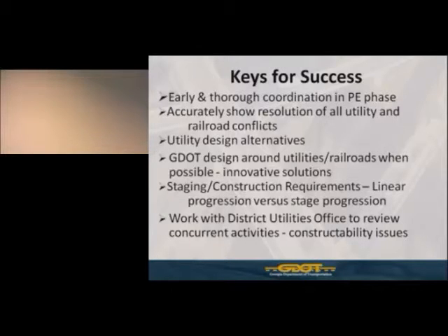Mentioned earlier and provided as part of the handout, the responsibility for utility owners to coordinate with one another, even in the pre-construction phase, for concurrent activities, dependent activities, physical relocation areas. You know, the old saying used to be we'd put utilities in the back 5 feet of the right-of-way, but when you're talking about a 12-inch water main, an underground gas line, an underground telecom, and a pole line, that 5 feet gets filled real quick. So utilities that were on one side of the road, we may request they go to the other side of the road. Those are all part of the preliminary engineering coordination process, the pre-construction phase, and that may impact how you have to develop your relocation plan. So keep all that in mind.